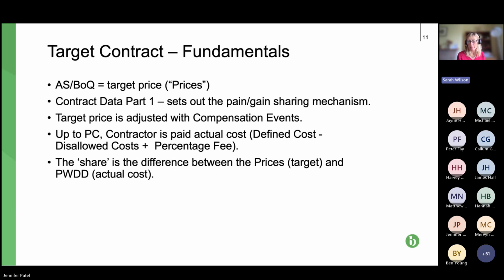So obviously the salary, the tax paid for them, including national insurance, company car, health insurance, cost of training, cost of holidays. All these costs are added up to work out a daily or weekly cost for each individual. Quite cumbersome, yes, it can be.